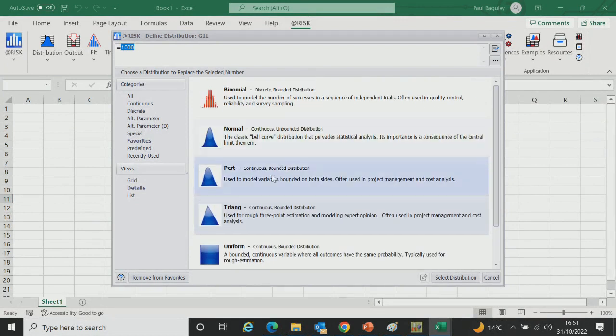How do you spell that? So that's a Bernoulli. So it's either a 1 or a 0. It either exists or it doesn't. And if it's a 0, then it doesn't matter because it's 0 times the impact. So if it's a 1, then it's 1 times the impact.